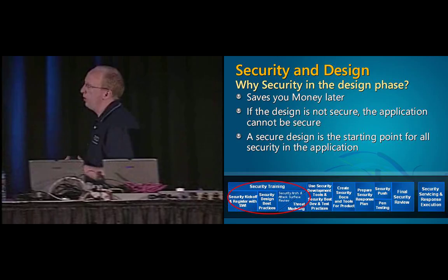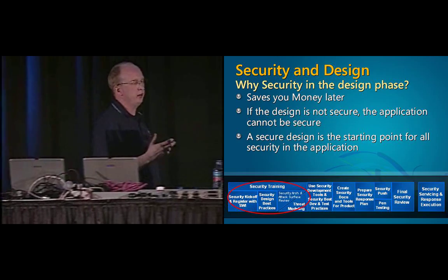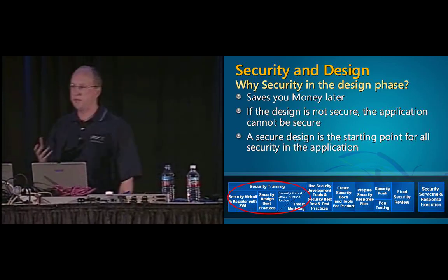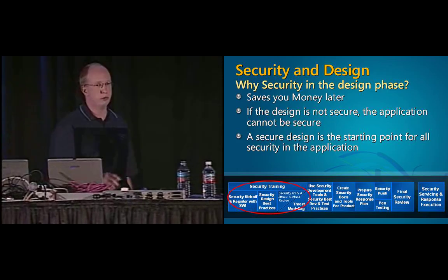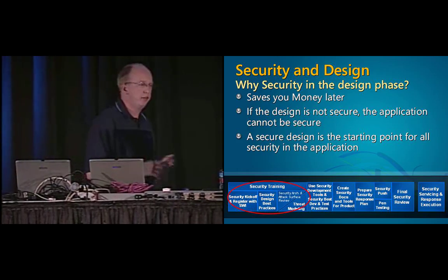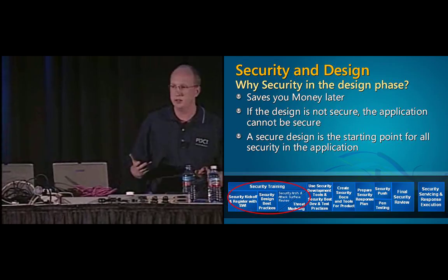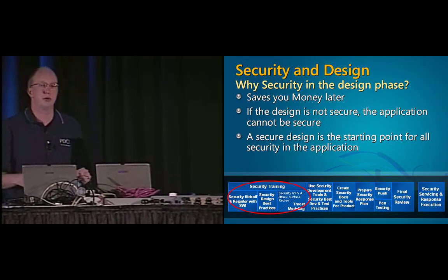So let's start by looking at why you do security in the design phase. Mike covered this and David covered this, and it's pretty obvious, right? It saves you money later. It's all about money, right? So it's analogous to the traditional development life cycle. The later you find a bug, the more expensive it's going to be. If you find a design problem in design, it's not going to cost you that much to fix. If you find it in production, it's going to cost you a lot to fix.